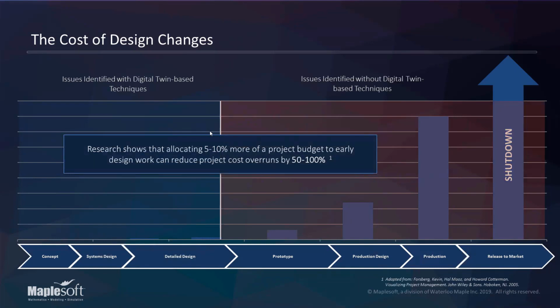And there's a bit of data for this. There's some research from a whole collection of NASA programs that were analyzed over a couple decades. And although it's harder to justify an ROI in just throwing money on the front end of a design process, at least some numbers do show that even if you can iron out a couple kinks that you'd otherwise find closer to prototyping or even production, there's huge cost savings in that. So being a little more proactive, even just a little more on the front end of your design process, is going to end up saving you quite a bit down the road.